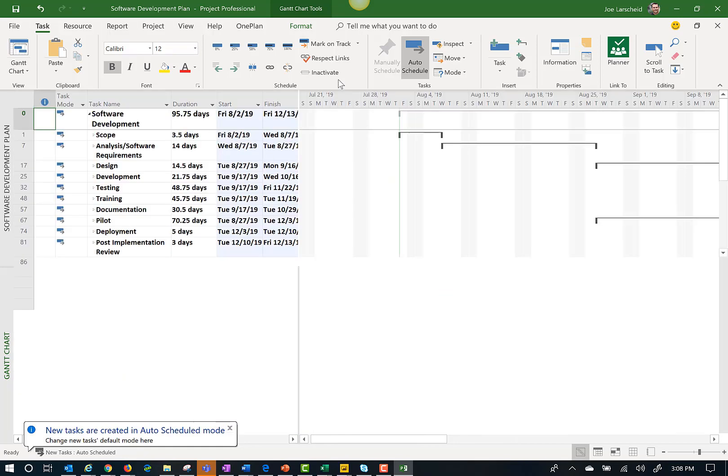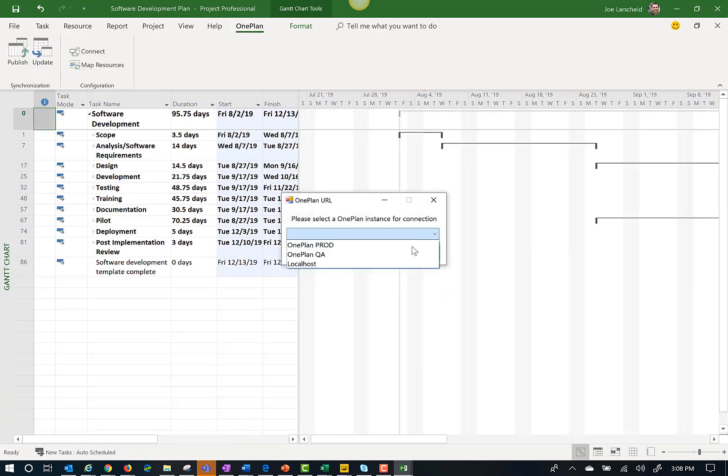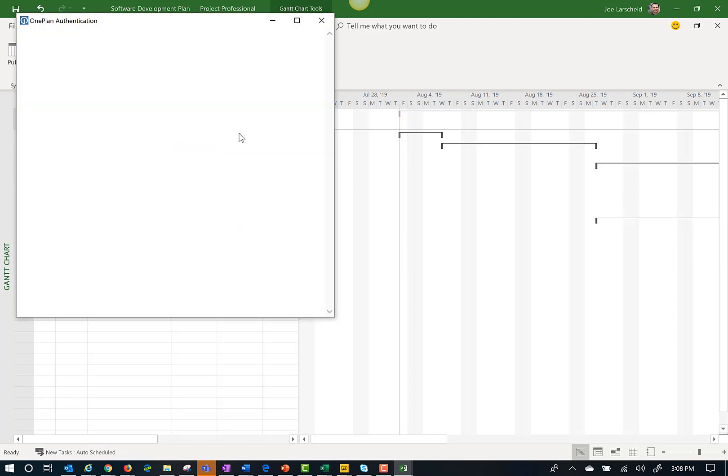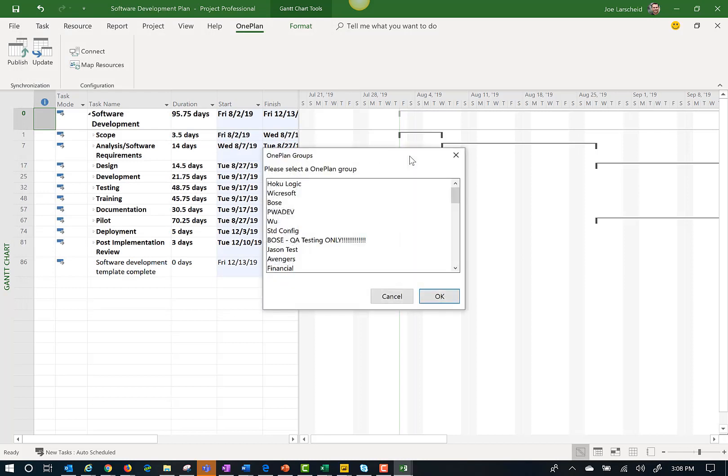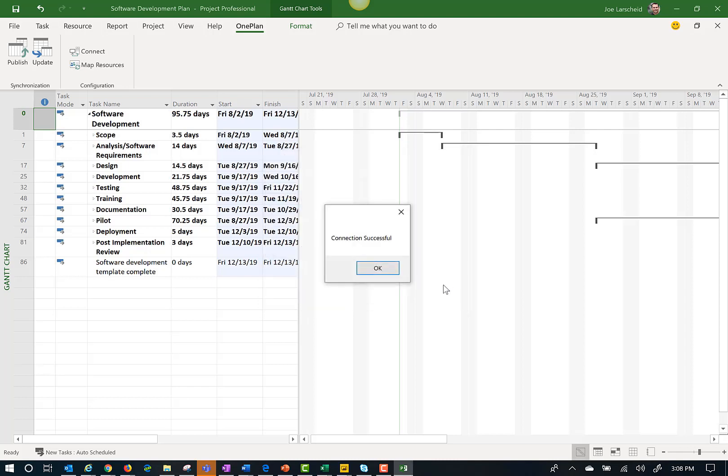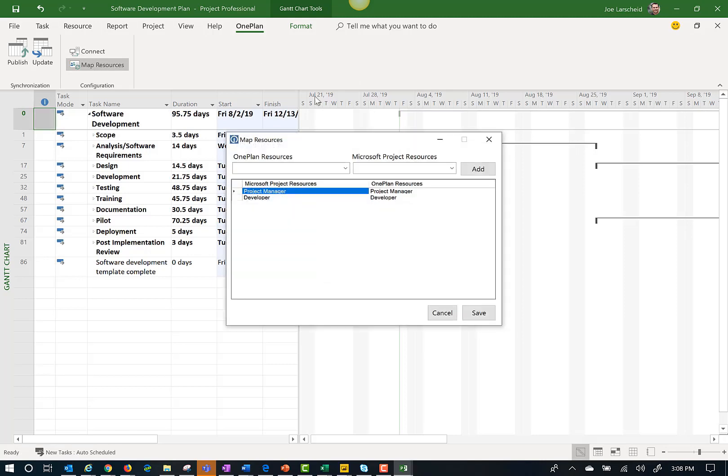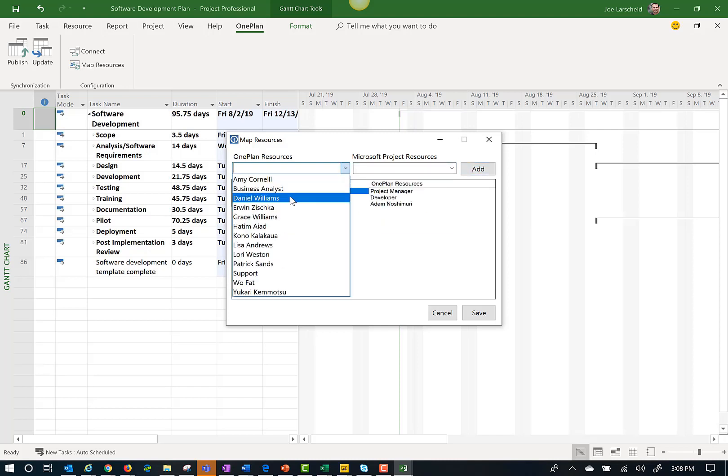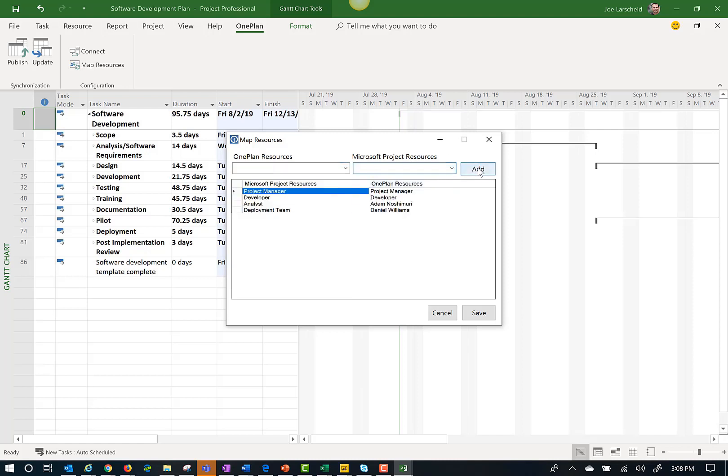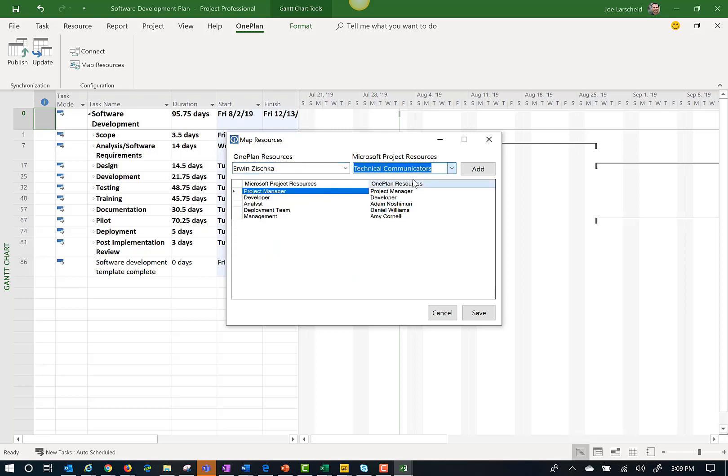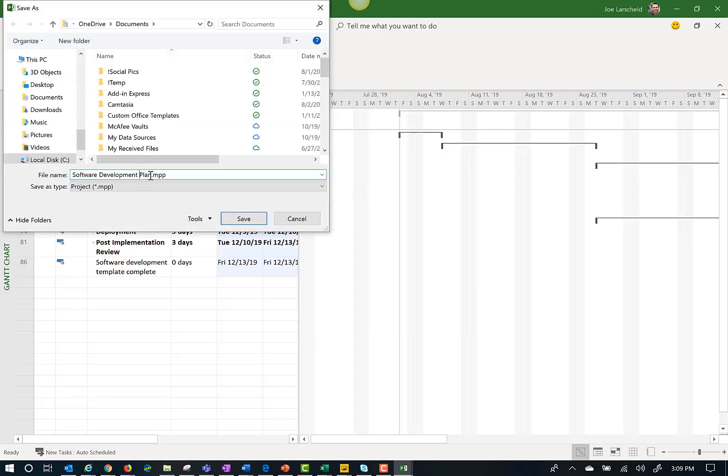Next I will go through the steps to connect this schedule to my OnePlan environment. Once connected the first step is to map my resources from OnePlan to the Microsoft project file. The connector automatically recognizes any names that are the same and maps them automatically. I can also map additional resources. For example Daniel will do all the deployment tasks. Amy Cornell is the manager. Erwin is technical communication. And once mapped I will save this project locally.